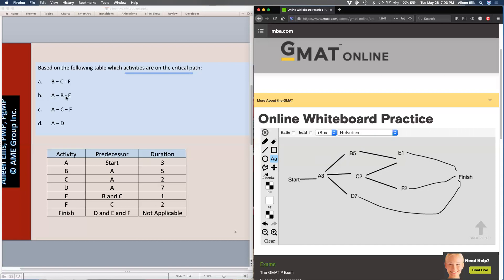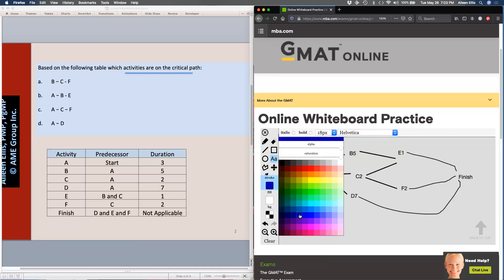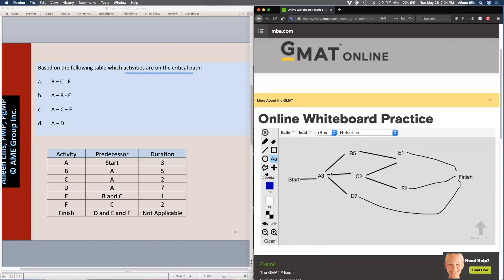Then I go to answer A, B, E. So A to B to E — I'm just changing my color to help you a little bit. A three days plus B five days is eight, plus E one day is nine. So that path is nine days. Then I go A, C, F: three plus two is five, plus two is seven. Well, seven is less than nine, so that path can't be the critical path. So that's wrong.